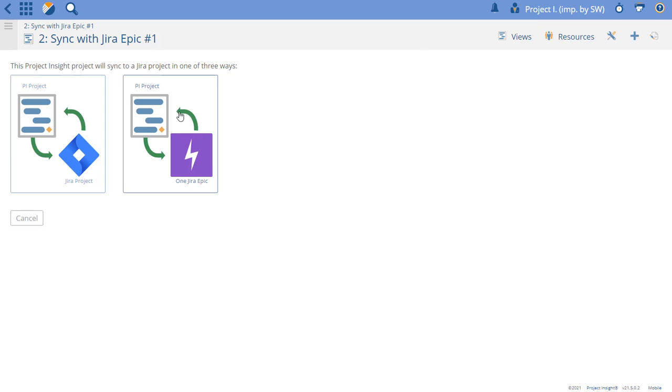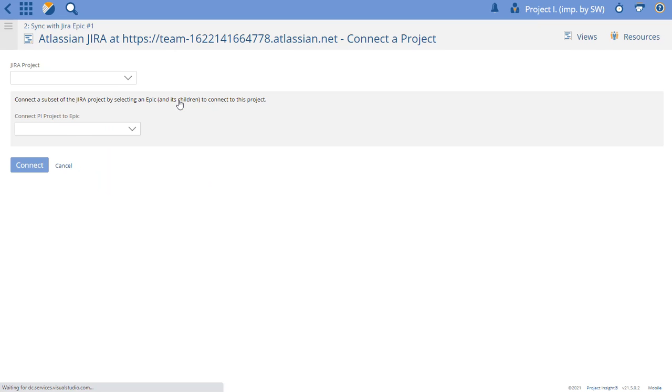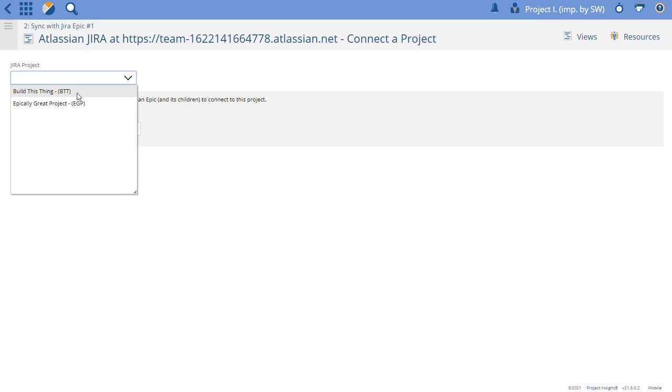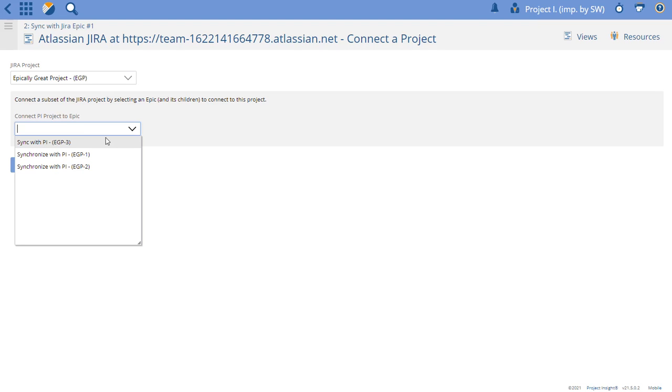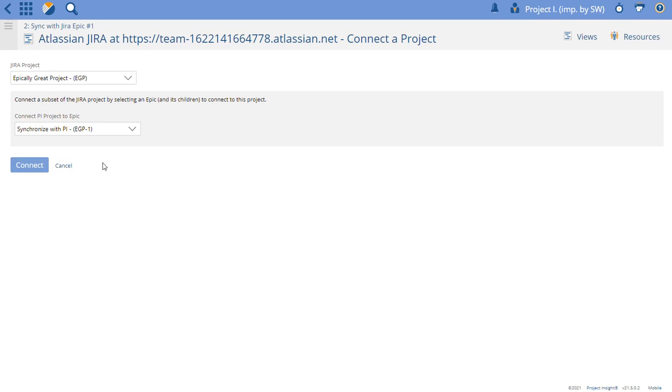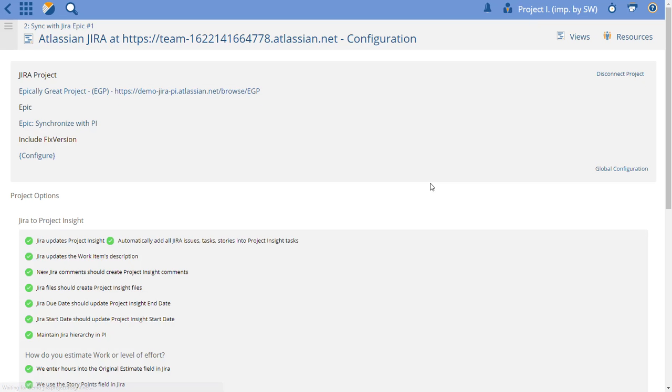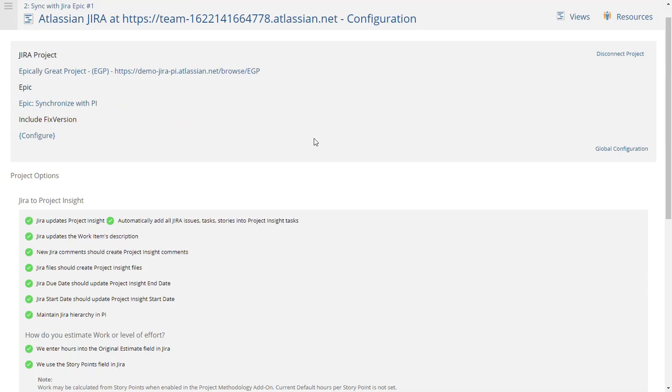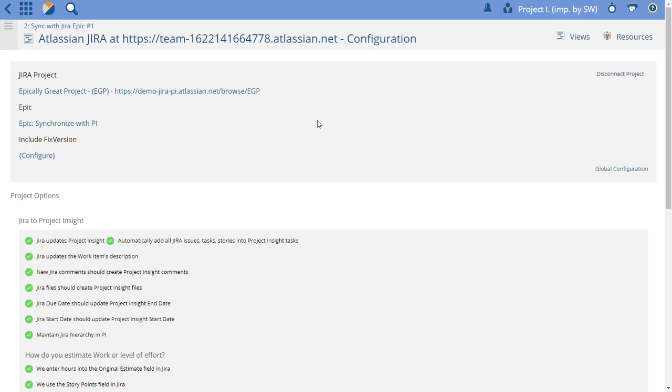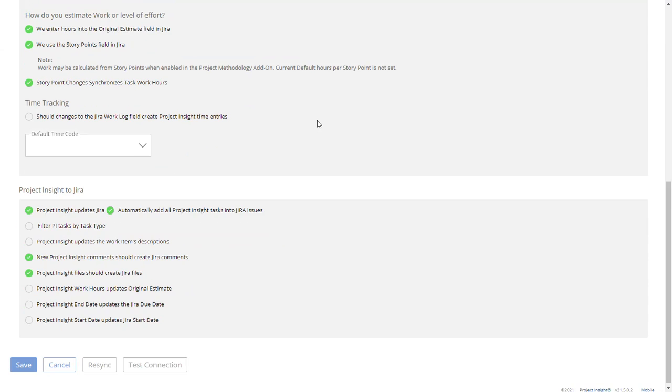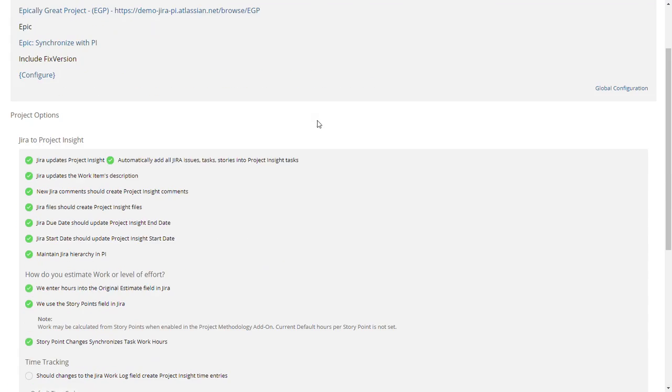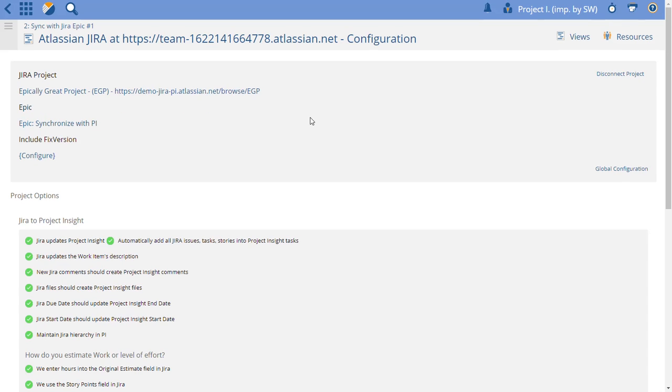Well, Epically Great Project right here. And let's pick synchronize with PI Epic number one, EPG number one, and hit connect. And so now everything that's created in Jira under that Epic will go into Project Insight, and anything created in Project Insight will now load into there as well.